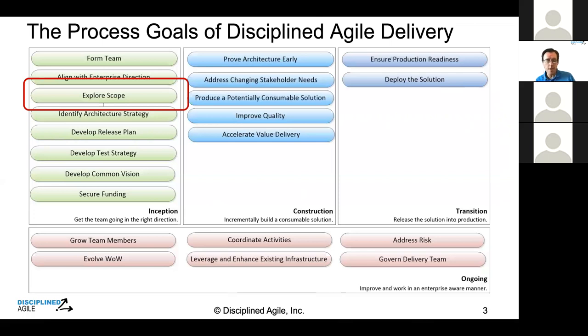I sometimes see technical work items in a work item list, and the work item list also has functional requirements in it, and it's owned by the product owner, but the product owner doesn't understand half of what's in the list because it's written in something like, do this with Kubernetes or whatever. They have no idea how to rank that in terms of value. So that would be my advice: write it in the terminology of the people who maintain it and prioritize it and size it.